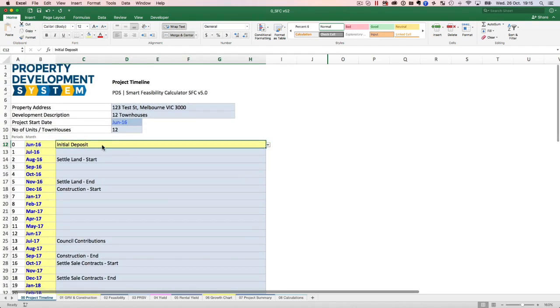So we gave a $5,500 deposit here, and we said, look, we need a due diligence period. Then we extended the due diligence period a little bit further, and then we said, okay, the due diligence period is complete, now I want to settle on this. We will do the settlement. So it was basically a 120-day settlement, but we had 30 days of due diligence upfront. Just to do the due diligence, we gave a deposit and we didn't do anything. Now, if I had pulled out during that due diligence period, I wouldn't have had to settle. I would have got my $5,500 deposit back, and everybody goes home.